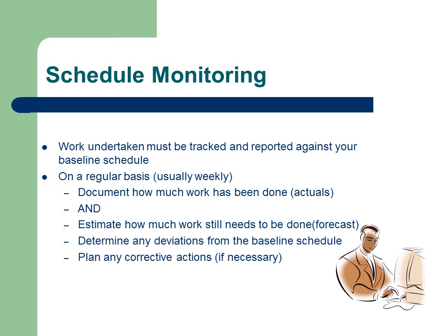The most common ways to bring a project back on schedule are working overtime and adding more resources. Of course, both these solutions add to the cost of the project. The other method is to reduce scope, but this means that you won't be delivering as much functionality to your customer. All of the above solutions, of course, must be approved by management and should be formalized using the change control process.